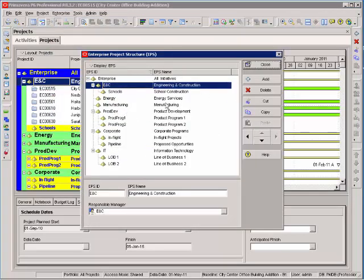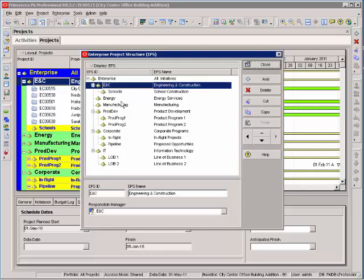From within this window, I can add, delete, move any of the EPS nodes that I want to have in my organization. Keep in mind, all of my projects are stored within one of these, so if I delete one, all of the projects get deleted with it. However, the convenience of it is if I move these, all of my projects move with it. So, it's an excellent way to store your project schedules and organize them and keep them for easy access.